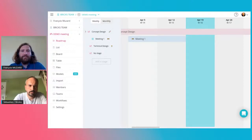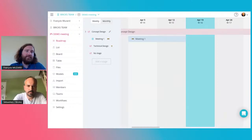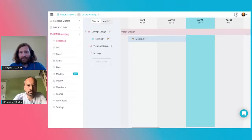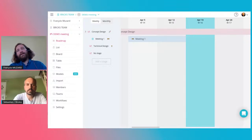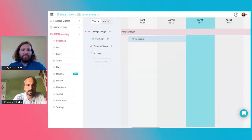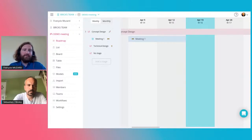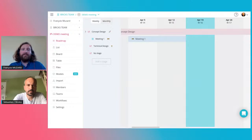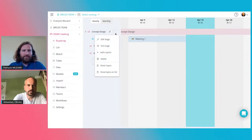We know that in the construction industry it's not totally the same, but think about how you share your BIM model — normally you decide with a BIM manager to share your model every one or two weeks. You already have this kind of iteration. You can choose to create sprints the same way you share your BIM model, or you can create a sprint every week aligned with your design meeting.